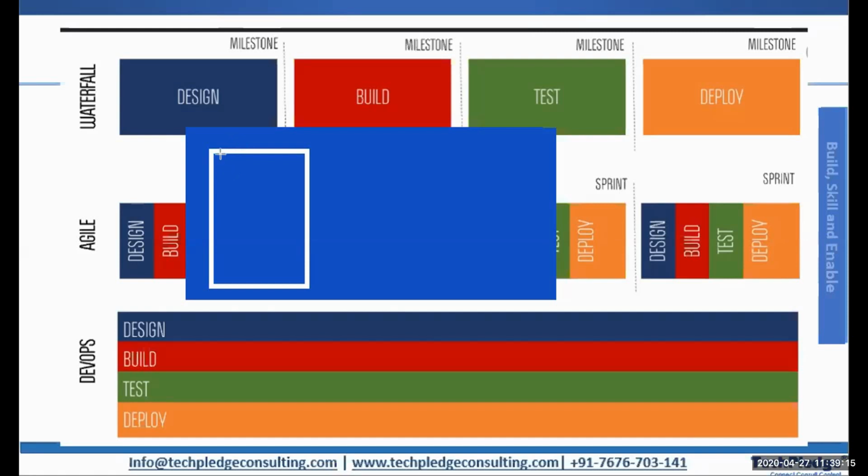Right? Now this would have certain features. If those are features, we would call them issues. Right? And these issues would be divided into small tasks, like the user should have, let's say, online class and self-defined class. All would be divided into certain tasks. So as soon as you complete these tasks, your issue is met, and then we complete one milestone or one epic. Correct? Now if there is something missed, or there is some feedback, we call it a bug.